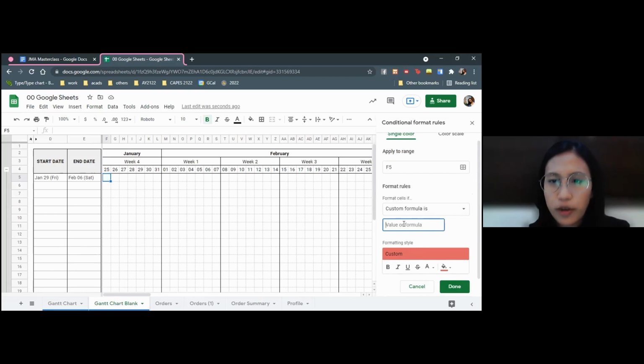And so the custom formula for a Gantt chart is, I'll type it first and then I will explain. AND(F4>=D5, F4<=E5). So what this formula is saying, and it's a logical operator that returns true if both inputs are true. This is like Philo 1 stuff. Now, you can see I have two inputs separated by a comma. If these are both true, then the whole formula will be true. And then, okay, so for the individual, they call it arguments, the individual arguments.